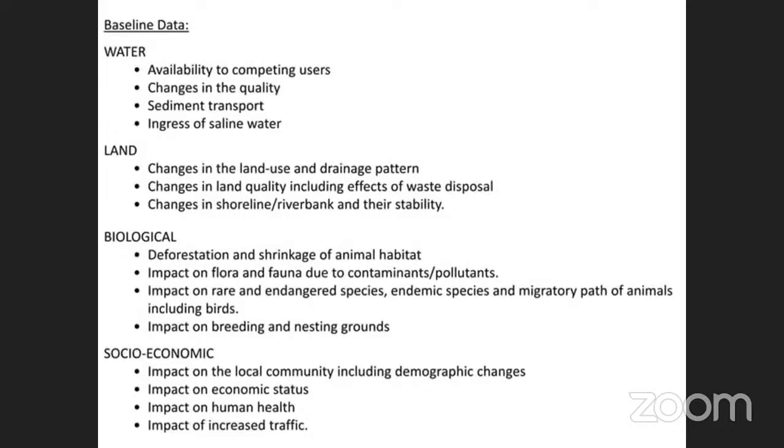In the surface water sampling, we need to select different locations to collect the water samples. The collected water samples are sent to the enabled laboratories to analyze the parameters, and that surface water quality data is incorporated in the EIA report.